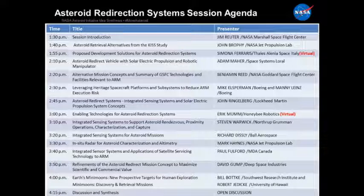So that's a really good point, and that's why what you need for a robust mission is to have multiple backup targets in multiple years, because the programmatics are such that we're not sure when you could launch, or if you run into technical difficulties and you have to launch 6 months or a year later, you need to have a robust series of targets in multiple years that you can go to. Because of the synodic period problem, if you miss it, you've got to go to a different target. Unless, it's not quite that black and white, because if you change launch vehicles, if you plan to fly on an Atlas V, for example, and spiral out from Earth orbit, and you miss that launch and have an opportunity to launch on a Falcon Heavy, you can make up that year to year and a half slip by eliminating the spiral out time and going directly. So you have some flexibility there as well.